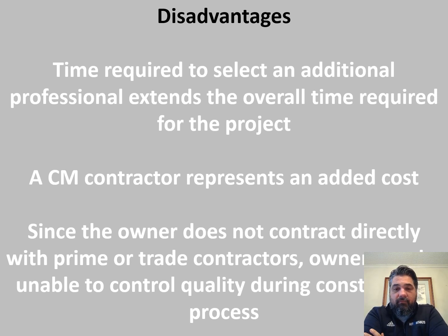You will be paying a fee during design for that contractor's pre-construction services when compared to a traditional design bid build. However, the hope is that it will save you time and save you money going forward, because they're involved much earlier in the project. Since the owner does not contract directly with the prime or trade contractors, the owner has less control of quality during the construction process when compared to construction manager as advisor or agent.